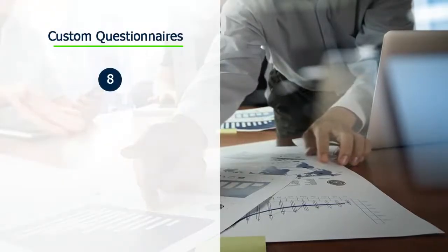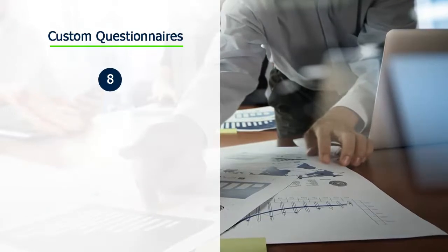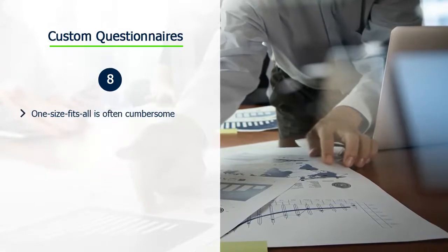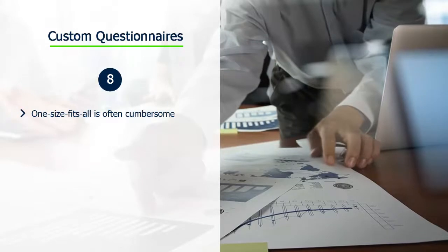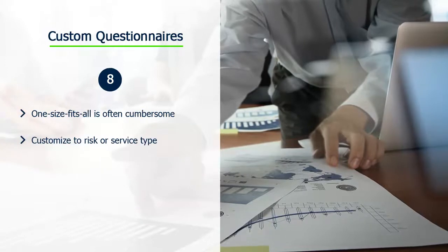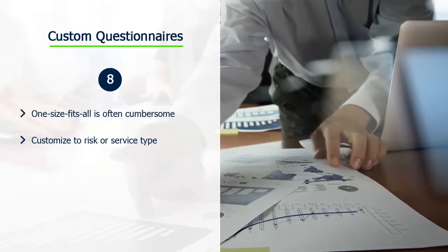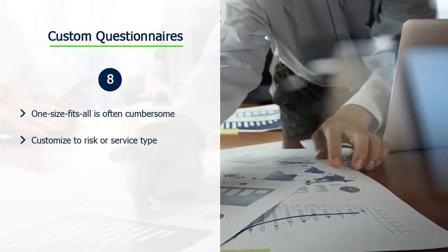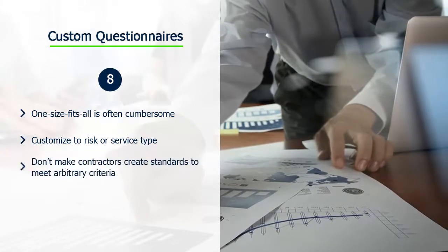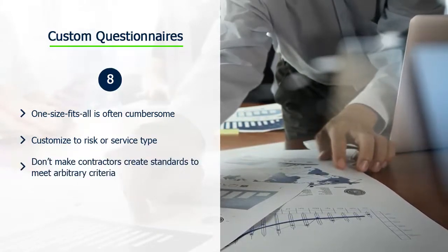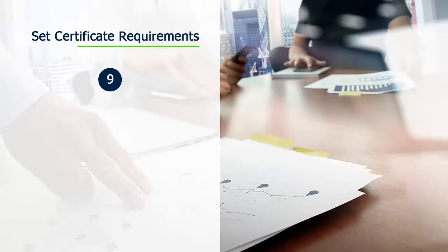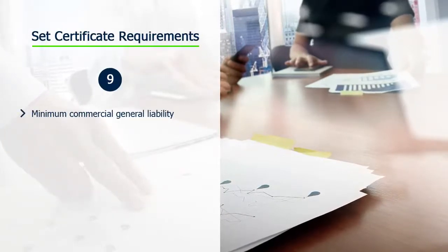8. Opt for service-specific questionnaires instead of generic ones. It might be tempting to use a one-size-fits-all questionnaire for your contractors because it seems like it would save time. But does it? Best practices indicate that custom questionnaires for specific contractor groups are value-added. For example, more information is needed from high-risk contractors. In addition to being practical and business-friendly, this approach reduces redundant content in the questionnaires, saving you and your contractors time.